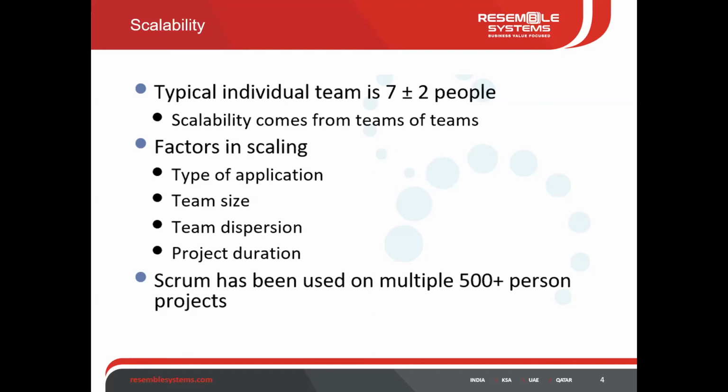So this approach allows scalability. Within 2 or 3 weeks, I can understand the velocity of the team, how capable they are, or whether I need to include more members or change the team. So I get all those ideas. Based on that, I can scale my team at any point of time, either team to team, or by including or removing team members.